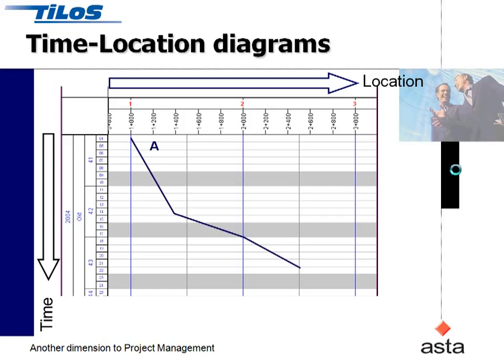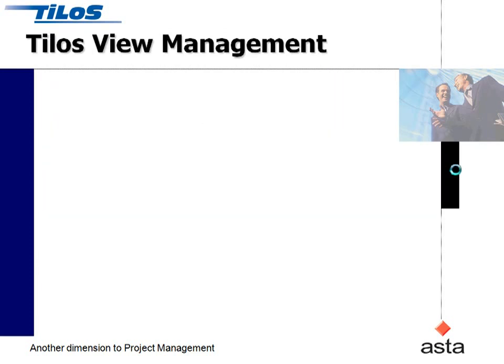With Tylos, we can switch those axes around. If we then plot the same activities, we've got activity A and there's a change of production there as it gets slower. And then when activity B is encountered, only on the time-distance diagram can you see the fact that there's a clash where these two items are operating in the same place at the same time. This is a situation you can avoid and plan out by planning in a time-location manner.